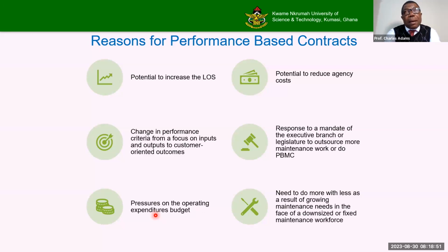Now, most performance contracts are designed in such a way that before you qualify for these kinds of price escalation issues, you should have completed a certain quantity of work and achieved a certain outcome so that the client is protected. So you learn from what you're doing, and you improve based on your local context and experience.